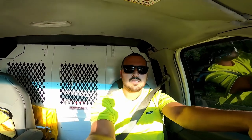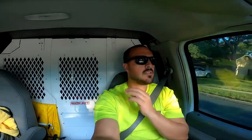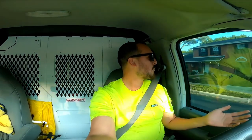All right, fast forward a few days. We're done with that job. It took us longer than expected, but we had 2 or 3 rain delays just from lightning and thunder and heavy rains. Also, we had to bring our own water for the job, and we added to the scope of work while we were out there. So in total, we cleaned about 12 or 13,000 square feet of flat work.